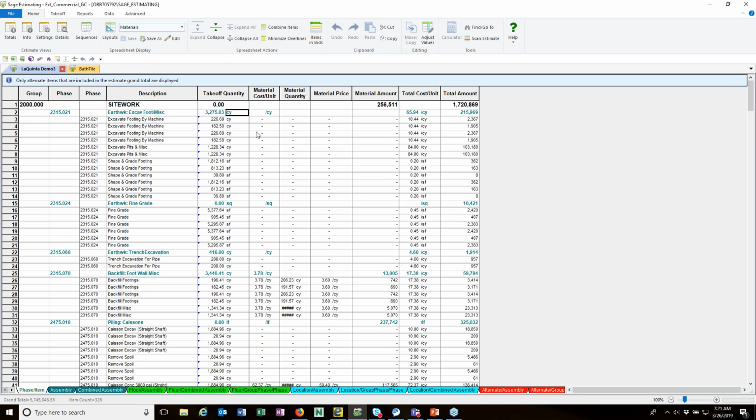It's using the unit of measure. If I change the unit of measure to a capital CY, for example, it zeroes it out because there's no other capital CY down here. But if I wanted to say, well, I want it based on this one, I change that, and now that's what my total is going to be based on. I can change this to 230 and it changes that. So it's based on the unit of measure, and it is case sensitive.